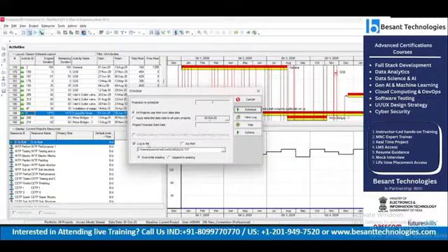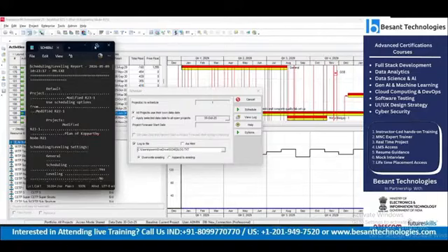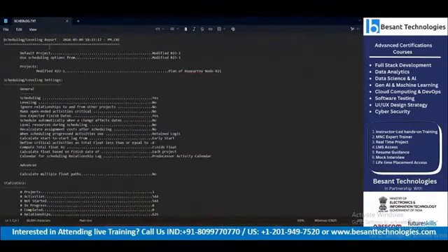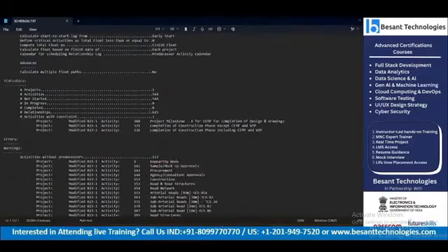And we have a log file here. If you select it and run the view log option, a notebook will appear, which generally says what is happening while running the schedule. It will say whether the scheduling is done, whether leveling is done, whether relationships are assigned to the activities.